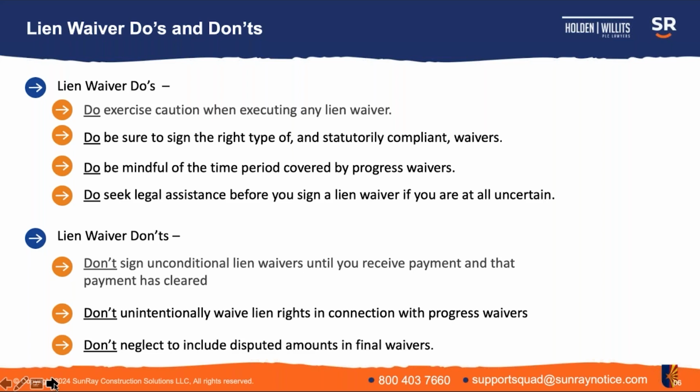Unconditional lien waivers, as the language in the statute provides, are unconditional, and they say that the lien rights are waived and the claims for payment are waived even if payment isn't made. A lot of times you will see folks upstream say, hey, I'm not going to give you payment until you sign an unconditional waiver. That can be a precarious situation as a lower stream party that's in need of payment. But generally speaking, you shouldn't sign an unconditional waiver until you've received the payment and that payment has cleared.